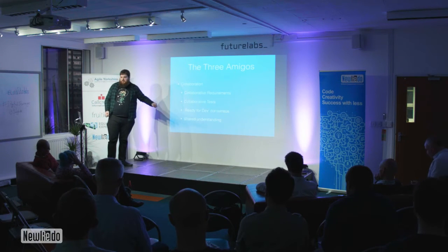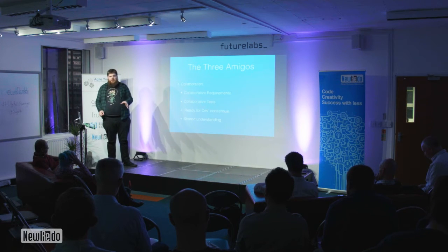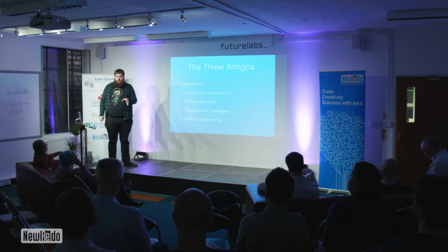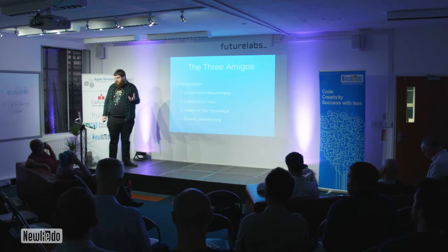And it's great because it enforces that collaboration. And enforces is quite a strong word. Encourages is maybe better, but it's all about working together and between the roles. So are we writing our requirements together? If we're doing automated tests, are we writing the tests together? And really making sure that the team all agree that something's actually ready to be built. Because there's nothing worse than a team getting halfway through something and saying, we weren't ever ready for this. Because it comes back to the waste that we were talking about earlier on. And the crucial part is the shared understanding. When we leave that specification workshop, that Three Amigos session, we all agree that this is the meaning behind that piece of work.